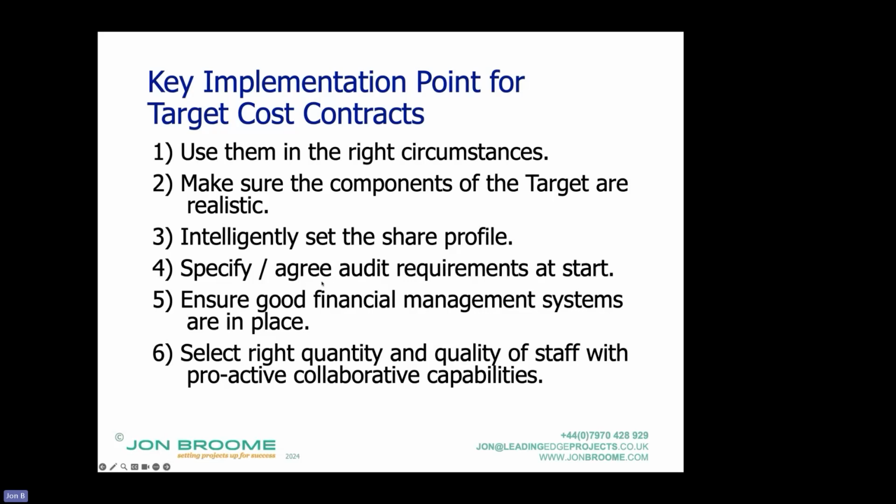Specify and agree audit requirements up at the start. And I could say a lot more on that, but I'm not going to. That means ensure good financial management systems are in place, and then you need the right quantity and quality of staff to actually administrate it. It does, as one person said, call for a high level of professionalism.